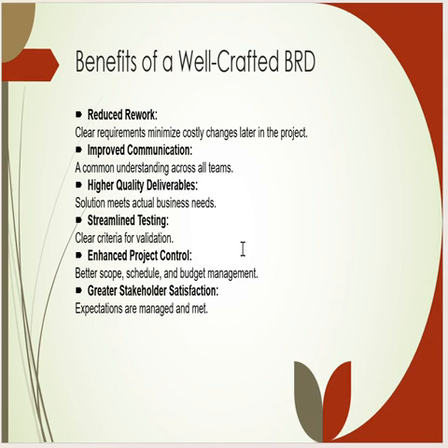It enhances the project control. If you have clear-cut objectives, in-scope functionality and out-of-scope functionality, it enhances the project control. There is no case where some team comes and says that part is not a part of your BRD. You should show them the in-scope and out-of-scope functionality of the business requirement document, so you will create a new business requirement document if that is a new requirement. Okay, so that's the importance of crafting the BRD.